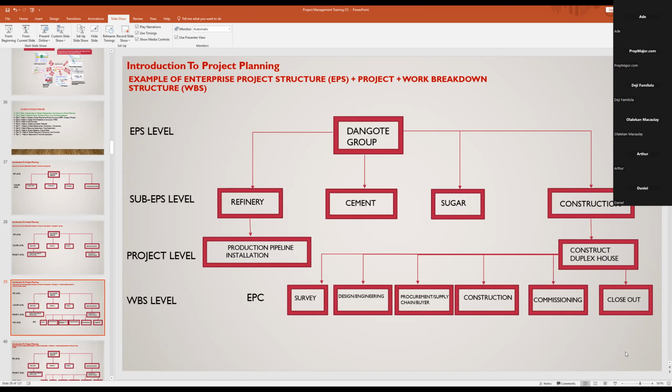Based on what P6 is telling me, this is going to run for 7 days. What can we do to recover or mitigate this risk? Because you are alerting them to the risk of running this project for 7 days instead of 6 days. In that case, what happens to your margin? Your margin will shrink to £300. So when you're reporting that to the SMT, they won't be happy.